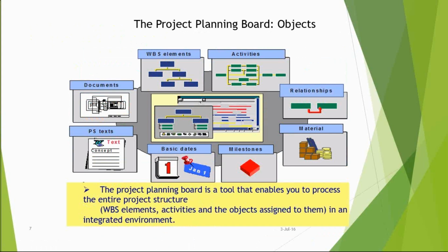Okay. And even in RRB, how exactly are we going to execute my RRB scenarios? In the profile, I will be having some factors on this particular kind of service materials. Suppose I'm using X service materials, I will be defining the cost of X service materials in my deep profile. And obviously in KP26, the per hour rate should be less than my deep profile rates. Then only my project will be in healthy status. If in KP26 my per hour rates are more than the rates in deep profile, ultimately it is saying that my execution cost is more, but my selling cost is less. Again, it is a marketing factor. If they want to sell, if they want to establish a market, management will do it that way. I'm telling you just the engineering part, I mean, how exactly we're going to calculate the things. Okay.